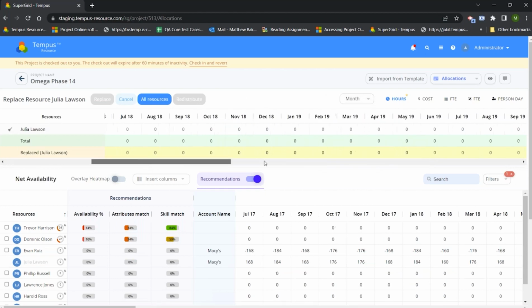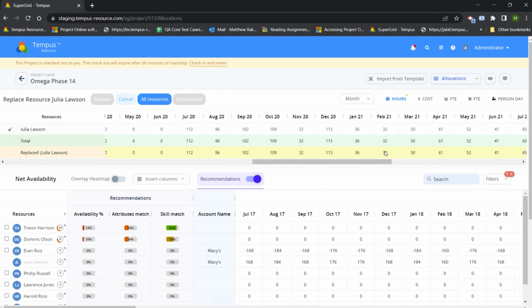It's going to be taking the availability against the asking amount of allocation, in this case in July 2020. Inevitably, it does go down to the daily level, but it's essentially going to say, does it have 120 hours of availability in this month to take on this activity? If no, it's going to evaluate that, and it's doing that comparison for all of the given months that the assignment is active for.